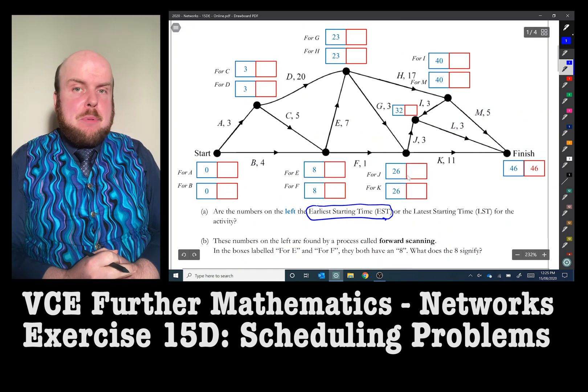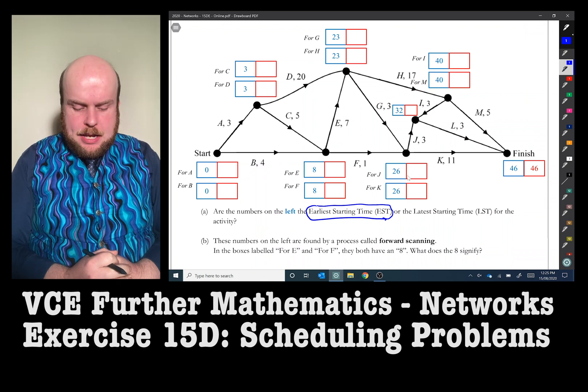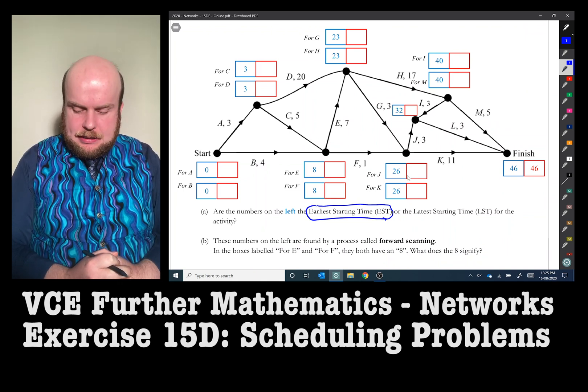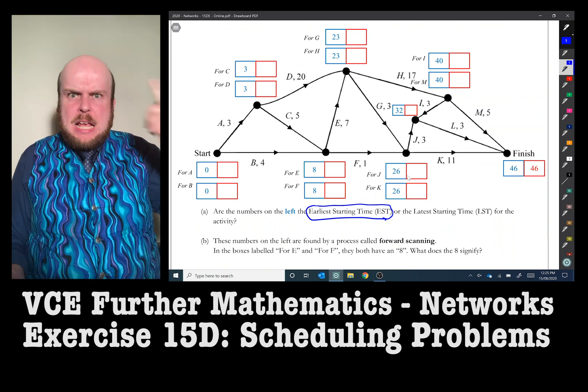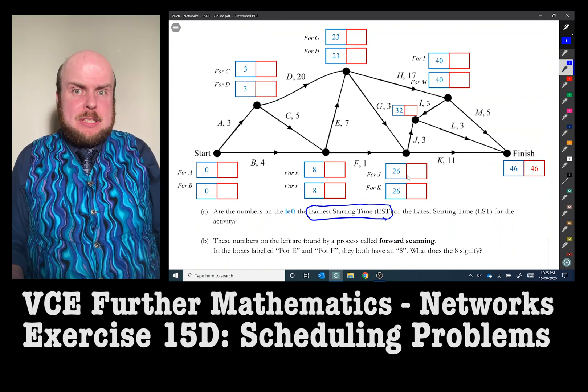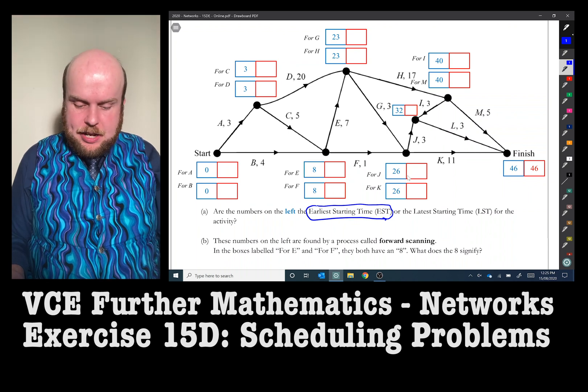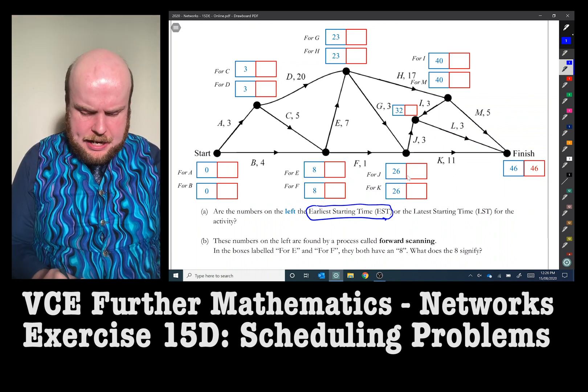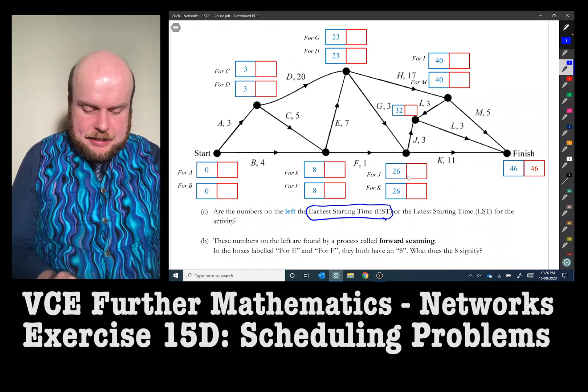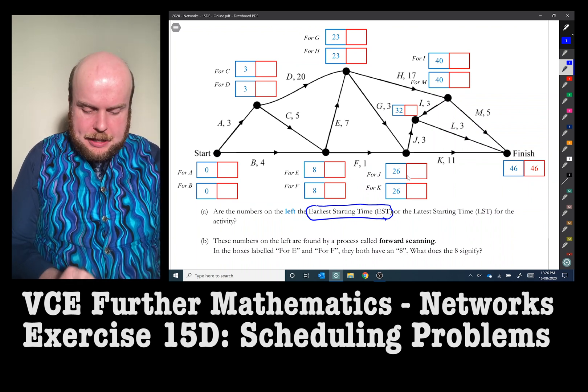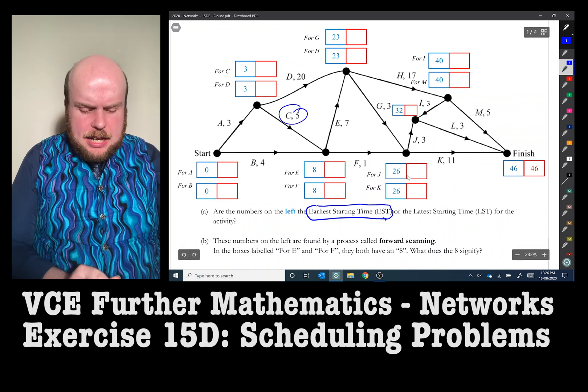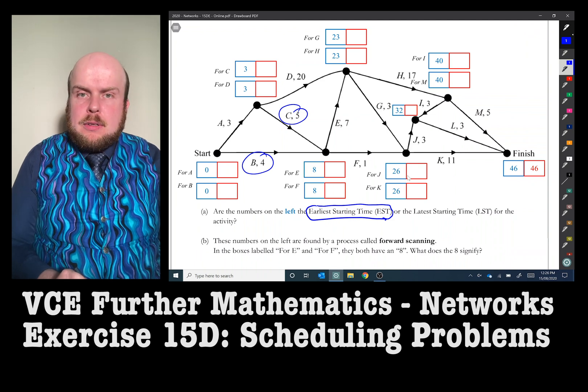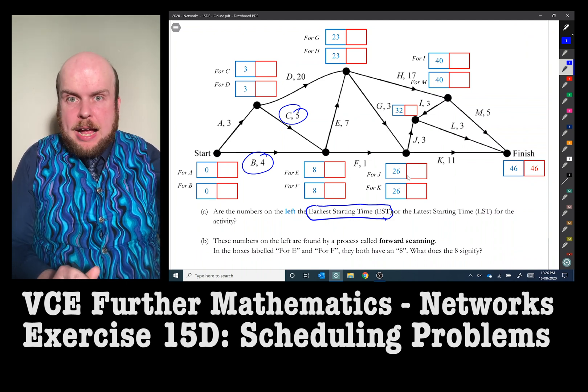These numbers on the left are found by a process called forward scanning. So in the boxes labeled for E and for F, they both have an eight, but what does the eight signify? Well, it might help if we look at what the predecessors for E and F are. What are the predecessors for E and F? The predecessors that come before it is C and B. So how long does it take to get project B done? Well, it takes four hours.